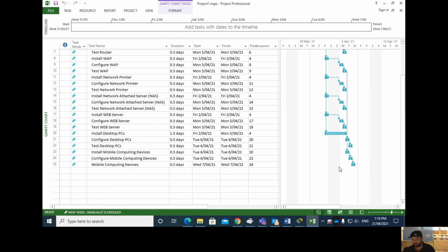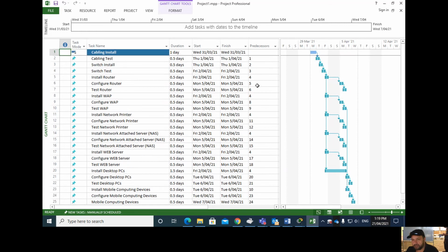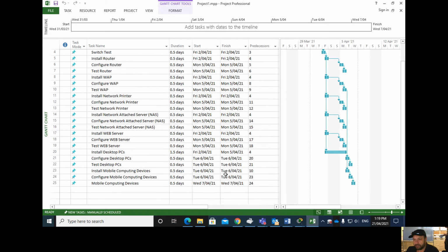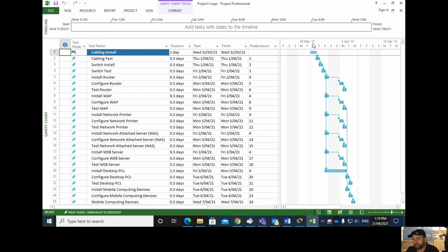Have you done this before or something? No, I mean like has someone done it? I did this one last class, well, a couple of classes ago. Do you remember? Yeah, we worked out the tasks. What are the predecessors? How long each task should take? We just guessed half a day. And so it gives you the dates, and then it gives you the timeline.